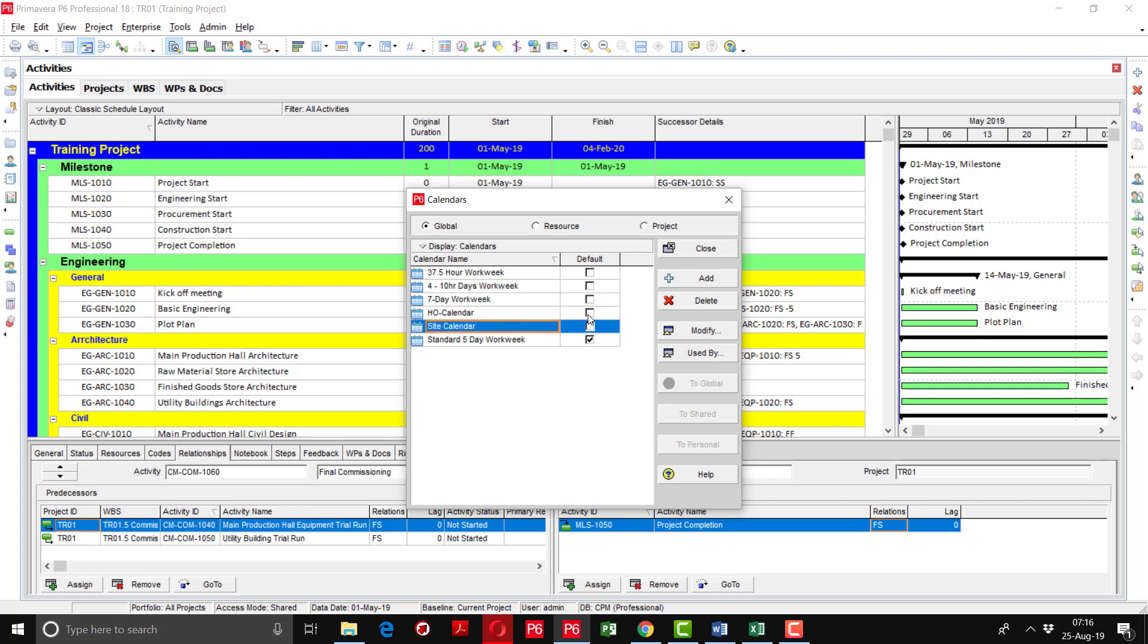It is very important to understand that there should be one of the calendars selected as a default when you create a project. The purpose of setting the default is that when you define the project, automatically that calendar will be applied to that project.